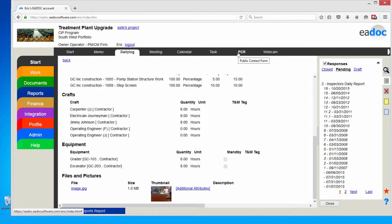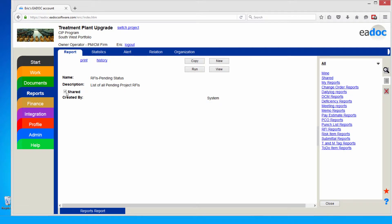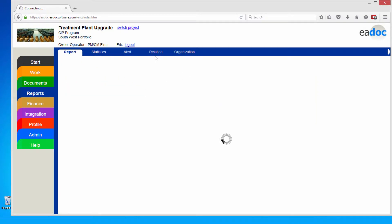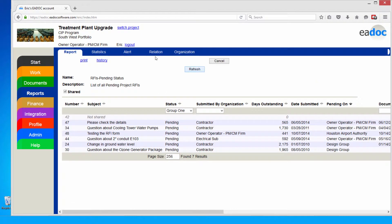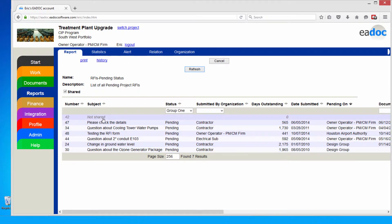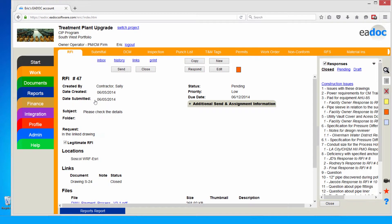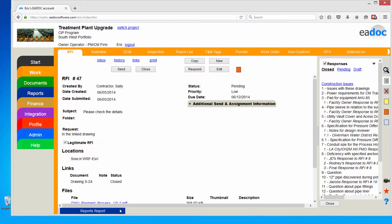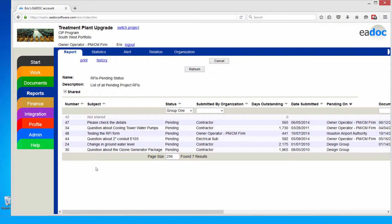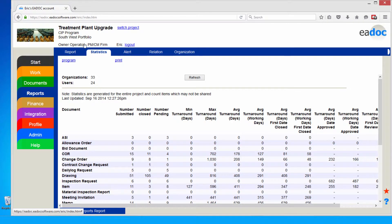I want to know exactly where every RFI is at any point in time. I can actually not just run reports, but everybody on my team can run reports. My subs and suppliers and contractors. The key differentiator here is they're only going to see data they have access to. If I don't have access to RFI 42 here, for example, it's going to show up as not shared. The RFIs you do have access to, I can drill down into. This way, everybody gets full features and functionality. I'm not just reducing costs for my own organization, but I'm reducing contractor costs, designer costs, consultant costs. Those costs roll up to me in terms of substantial cost savings as the owner or the program manager on this project. You can also do statistical analysis with this information. What's the min and max turnaround? How fast is information moving on your project?